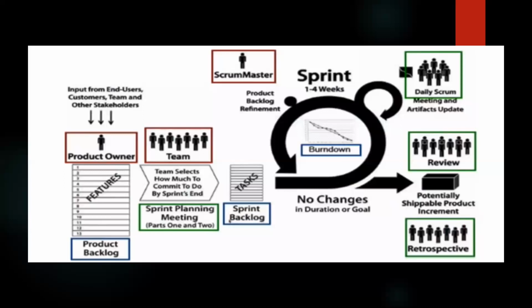During the sprint, what the team committed to deliver does not change, and the end date of the sprint does not change. This is the major point we have to note down here. During sprint planning and development, what the team committed to deliver does not change. So no change once you start a sprint, and the end date of the sprint does not change. This enables the team to make and keep commitments.